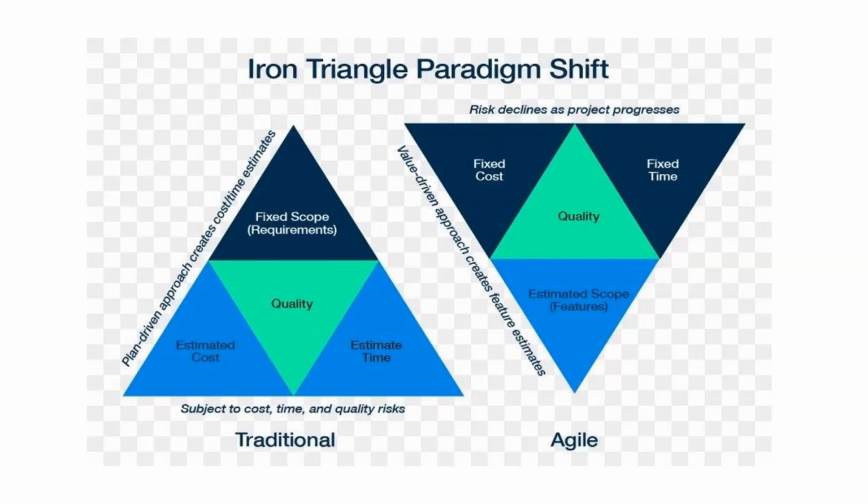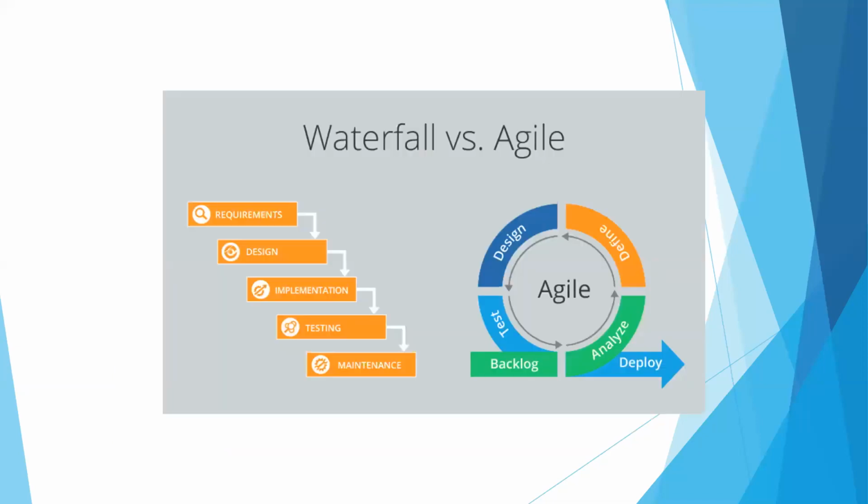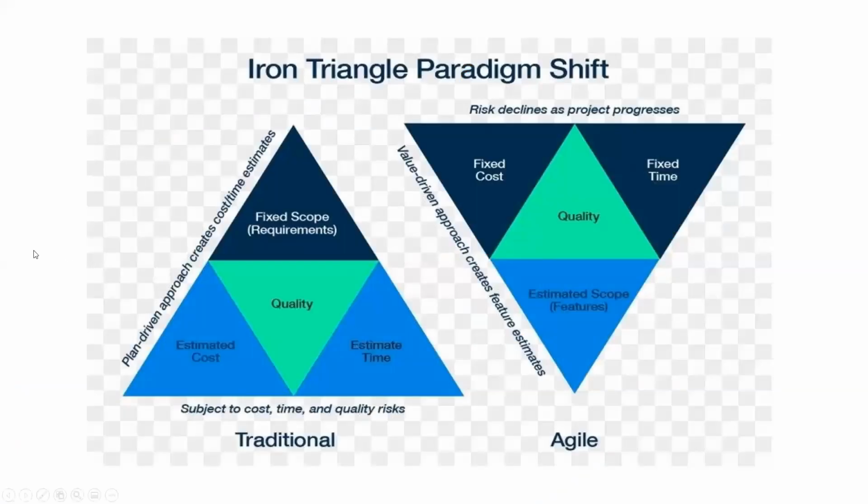or that may impact your scope. In traditional project management, your scope is fixed, in such a way that when you agree the scope here, all the requirements, the work that needs to be done, is pre-agreed at this stage. At requirement analysis it is frozen. We are meant to do 1 to 10. But our cost is flexible, and the time is flexible, because those are subject to change in traditional project management. But in agile, the scope is not fixed.